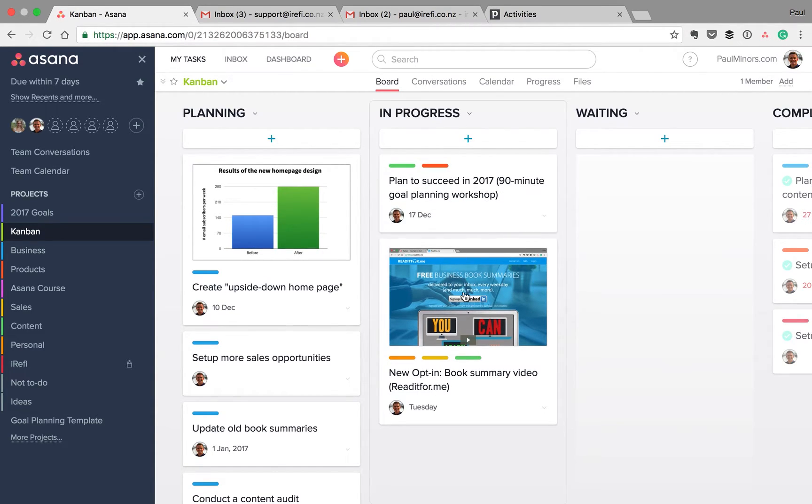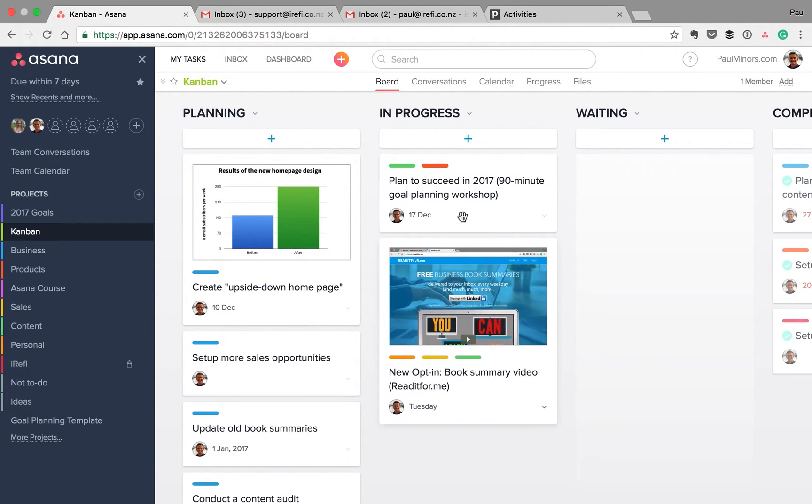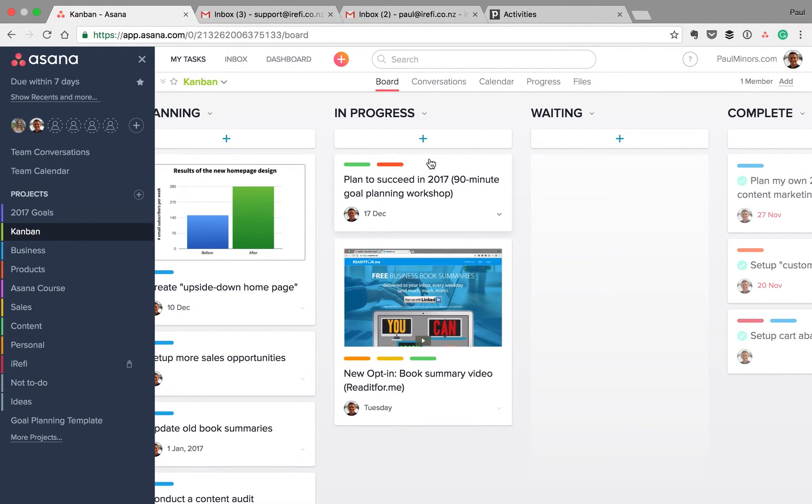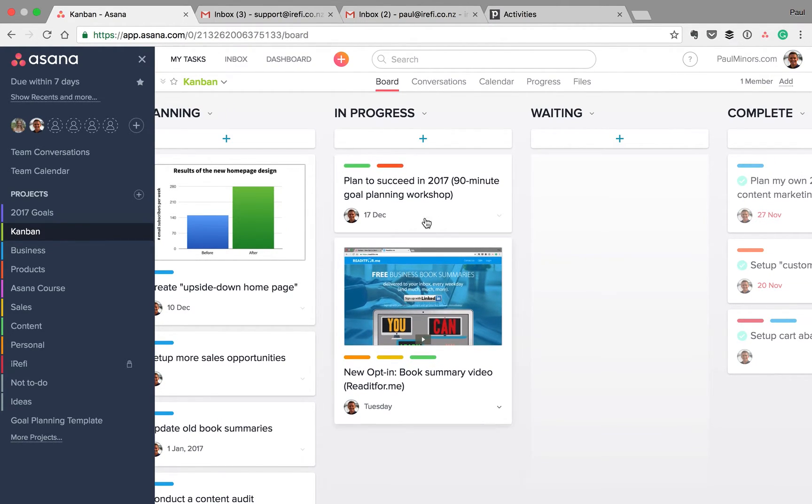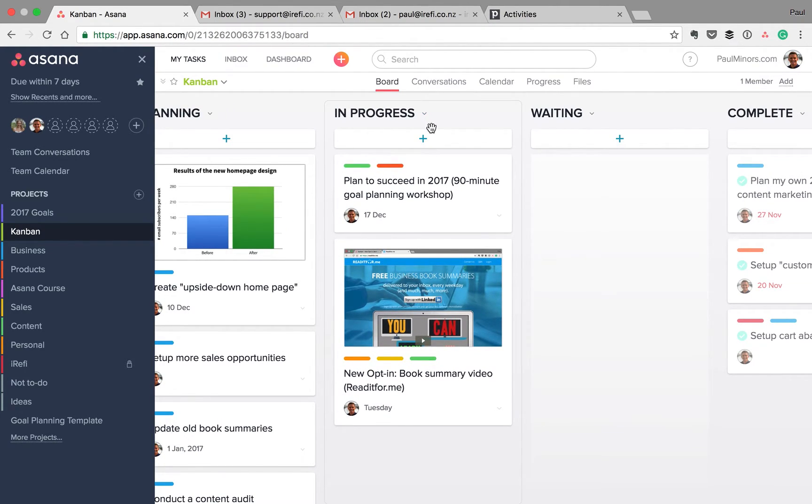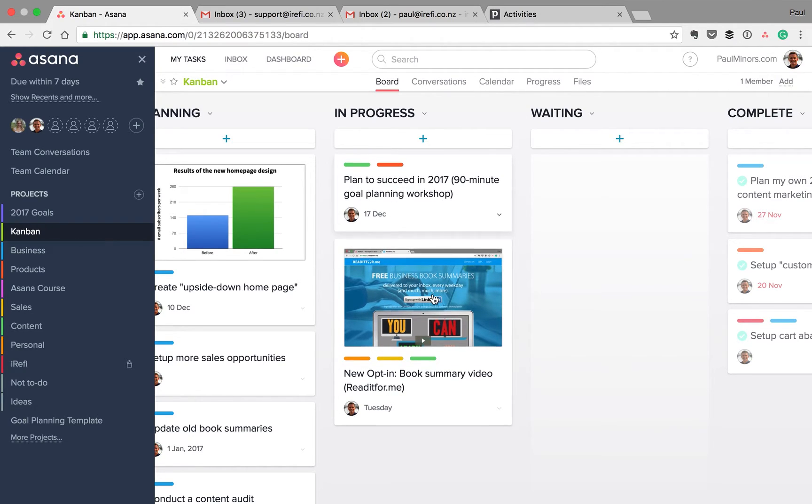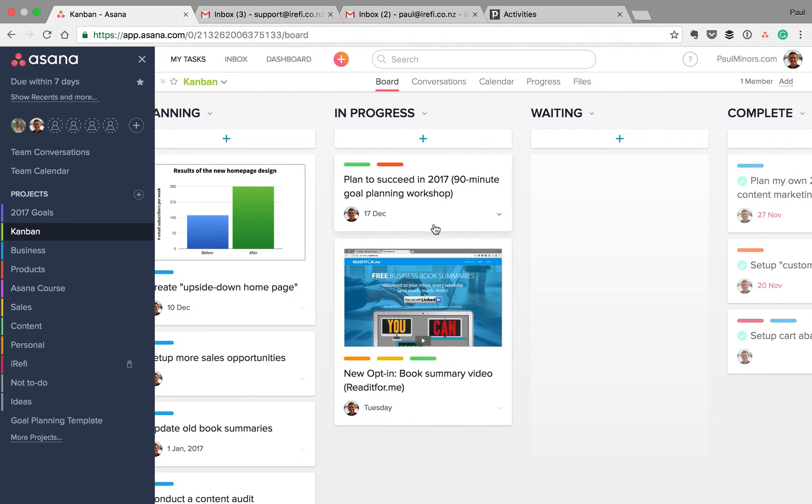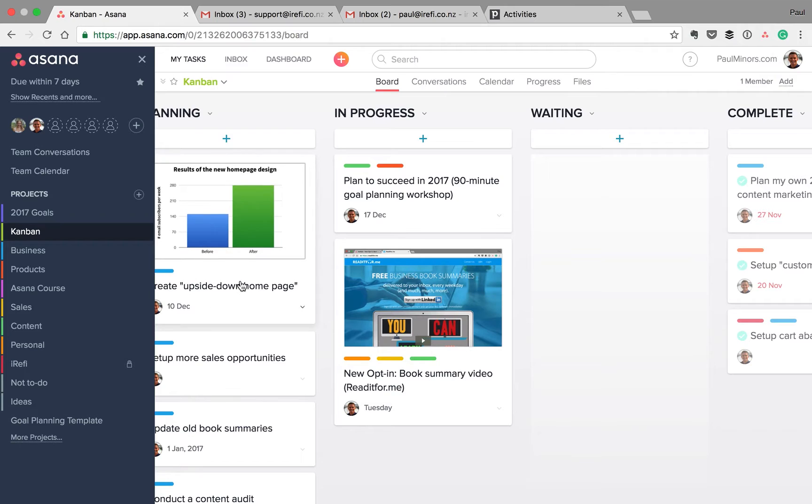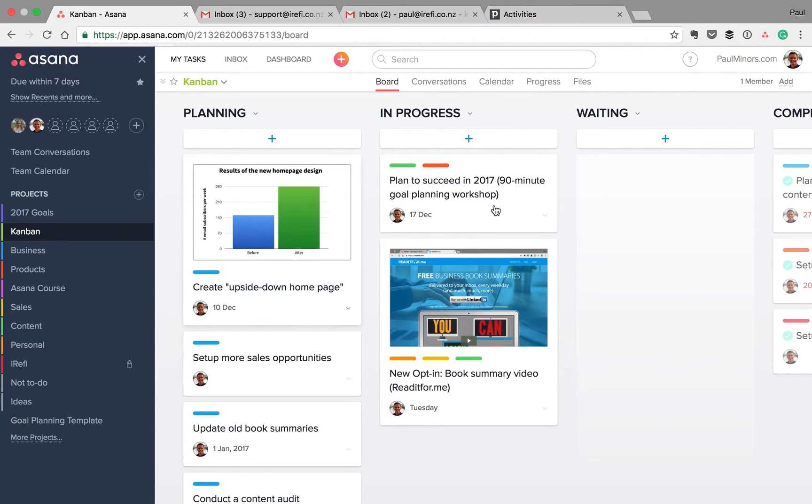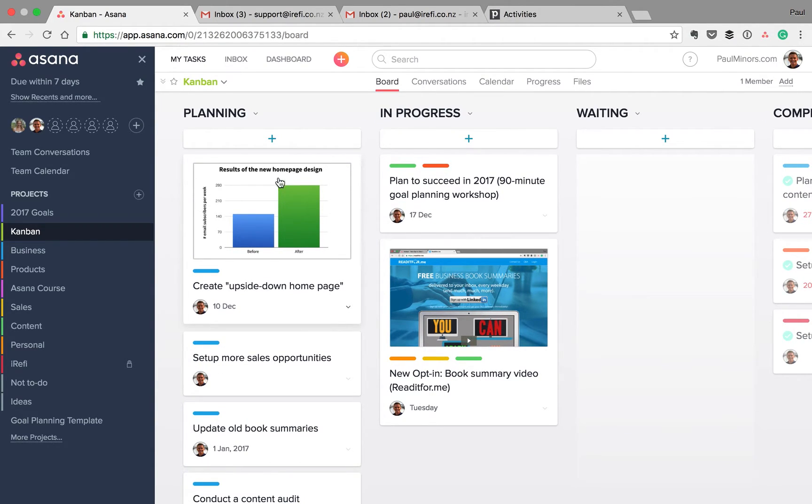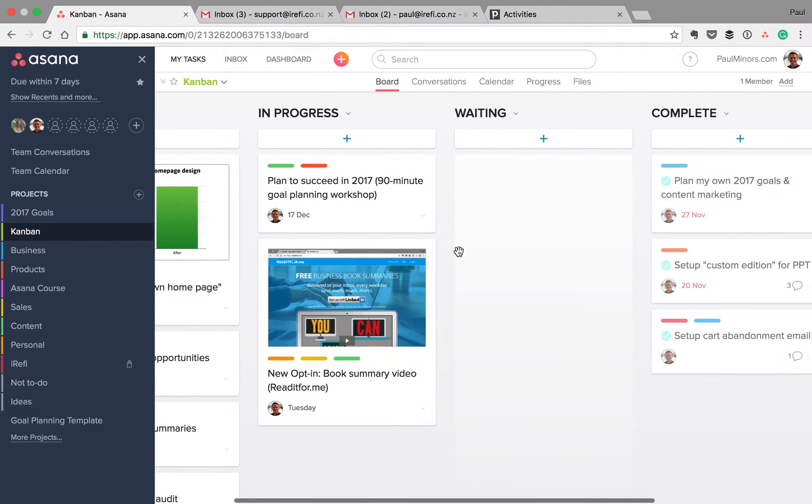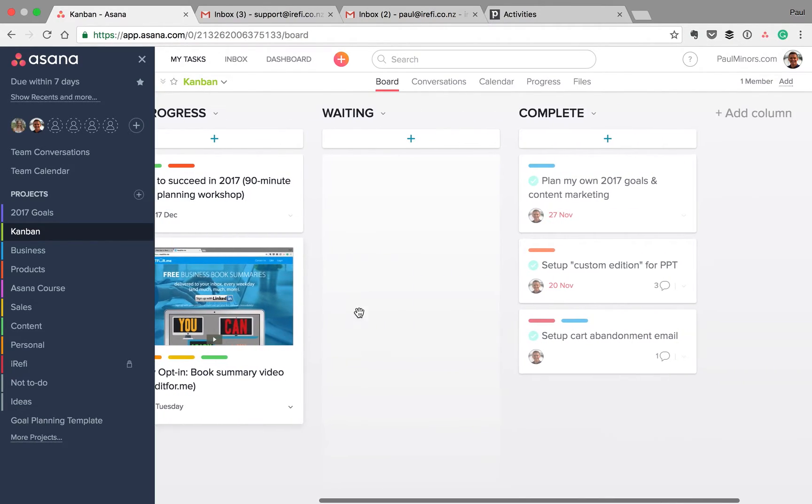There's things that are in progress. These are the things being worked on right now. The objective really is to limit how much you have in this column. Maybe you set yourself a rule like I can only have three things in here at once or two things at once. And in order to start something from this column, in order to move something over and start a new piece of work, you have to finish one of these first. So that's the in progress column.